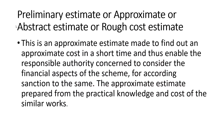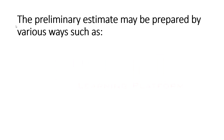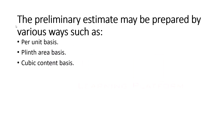The preliminary estimate is an approximate estimate made to find out an approximate cost in a short time, enabling the responsible authority to consider the financial aspect of the scheme and accord sanction. This approximate estimate is prepared from practical knowledge and cost of similar work, and may be prepared by various methods such as per unit basis, plinth area basis, cubic content basis, or approximate quantity method.